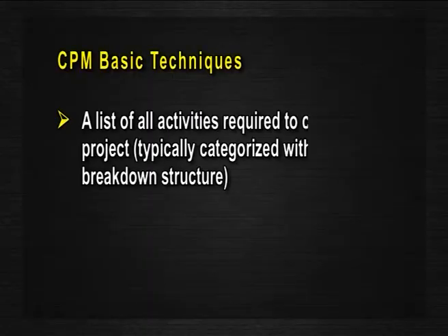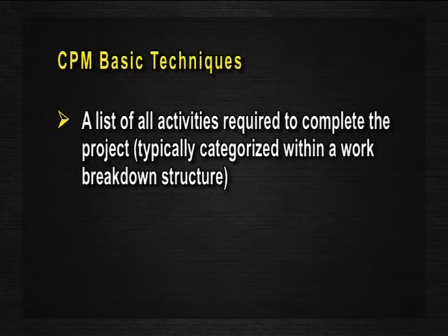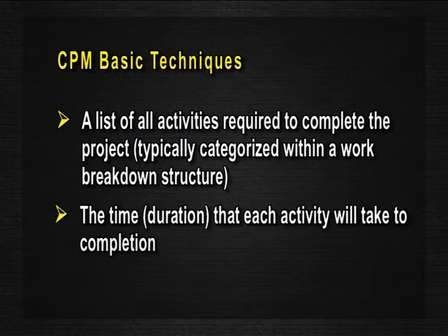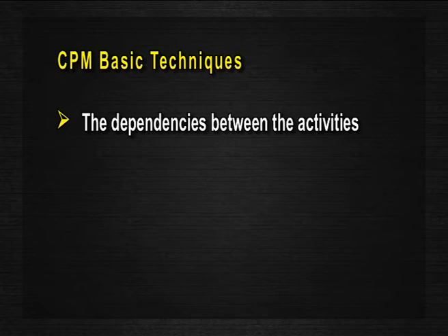Now, next moving on to CPM basic techniques. The essential technique for using CPM is to construct a model of the project that includes the following. That is, a list of all the activities required to complete the project, typically categorized within a work breakdown structure, the time or the duration that each activity will take to completion, and the dependencies between the activities.